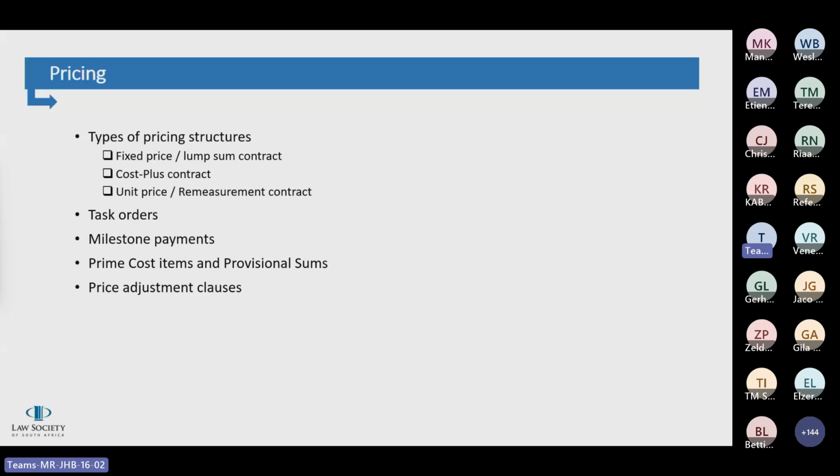The contractor does not have to be concerned about justifying the price of any of the work within the scope of the contract. Although the price may alter during the carrying out of the works, for example due to variations or the occurrence of certain relevant events, the pricing option tends to give the employer a reasonable amount of price certainty. The disadvantage is, however, to the employer that due to the risk allocation on the contractor, the price is likely to be higher.